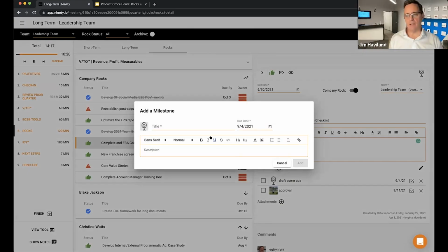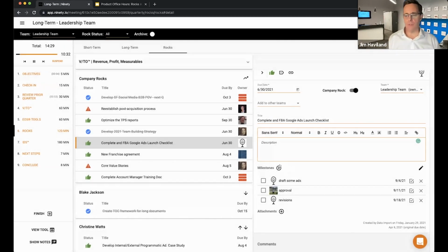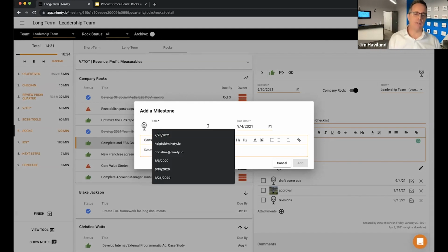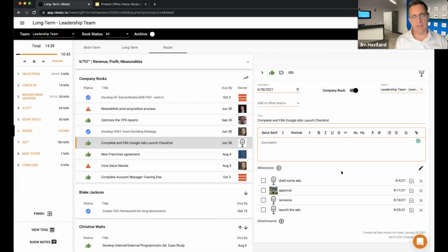And early on, I give my clients a hard time if they don't give me 13 items as milestones, one a week. Just so it's never going to catch up on you. You're never going to suddenly have to spend 3 days on your rock every week, because there are going to be things that you suddenly realize, I can't get that done this week. It's going to have to wait till next week.